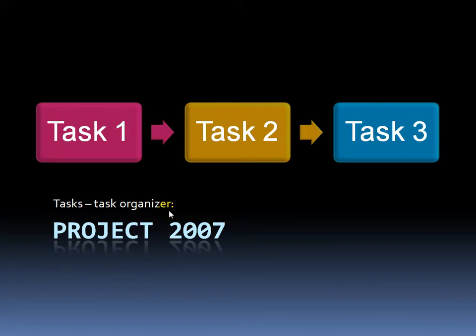A very simple and basic example would be to say I'm writing a book. My first task would be to research the book, then next write the book, and then finally print the book. Now, these tasks here are linked up in a relationship.